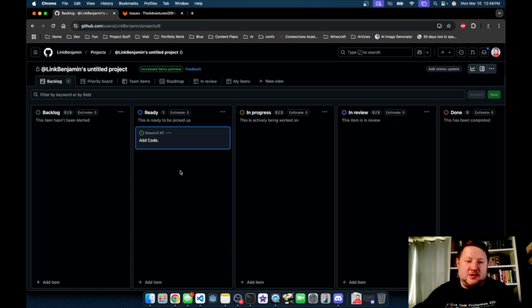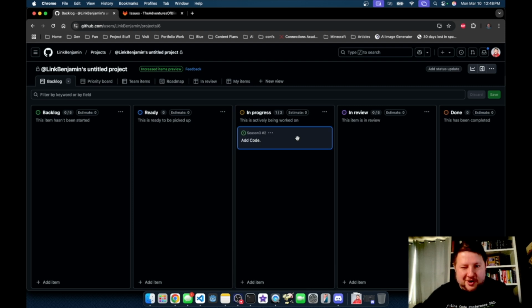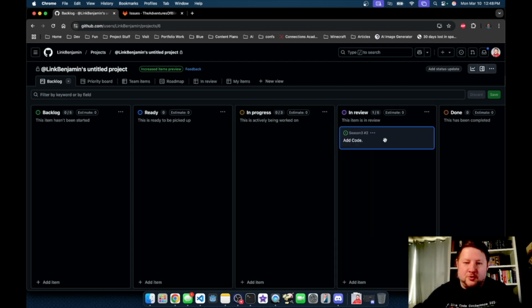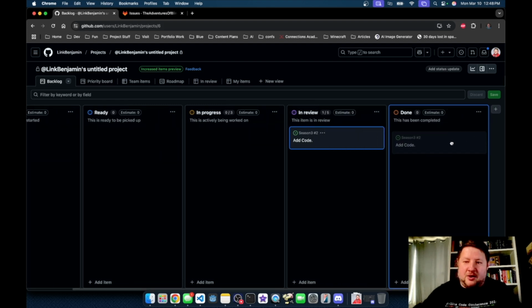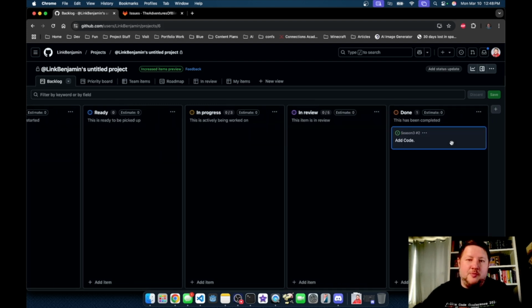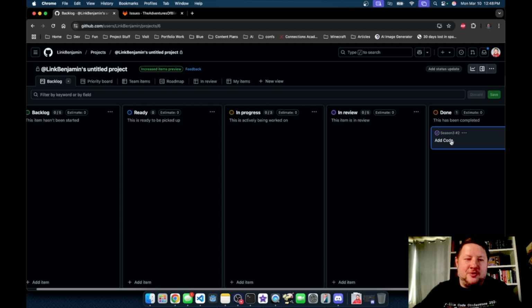And so we move it to there, and somebody comes and picks it up, and then they would move it to in progress. And then once it's in progress, they would say, hey, I've finished the work, and they'd move it to in review. Somebody would review it, check it off, ensure that it's been pushed up. And when it's been merged into production and you've done your PR and all that, then you can mark it as done, and it goes on the board that way.